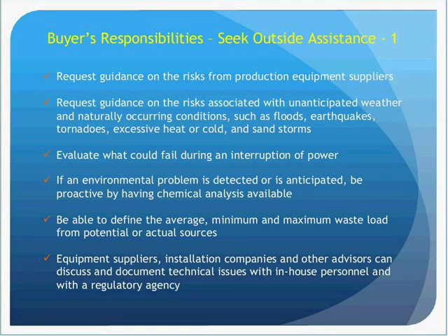Legal professionals, technical consultants, and suppliers are sources of outside assistance. These sources are called upon for advice and guidance regarding risks and deliverables. The end user should list acceptable risks and those that are unacceptable risks. Unacceptable risks may be reduced or eliminated by having standby equipment, standby procedures, or services available.